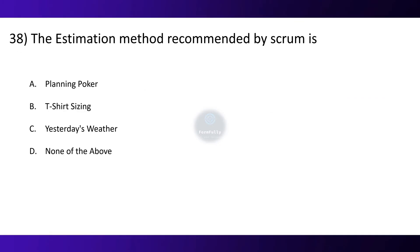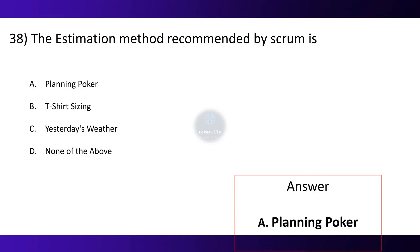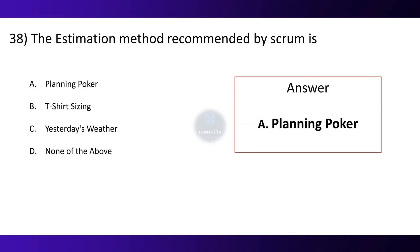Question 38. The estimation method recommended by Scrum is: Option A: Planning Poker. Option B: T-shirt Sizing. Option C: Yesterday's Weather. Option D: None of the above. The correct option is A, Planning Poker.